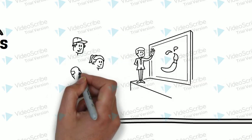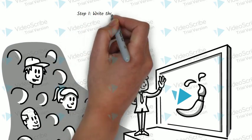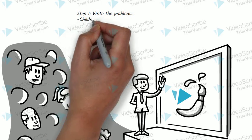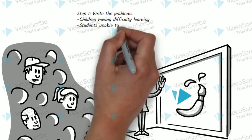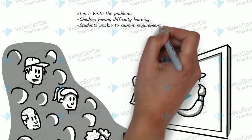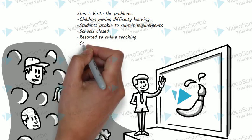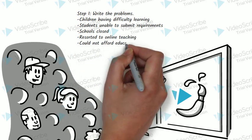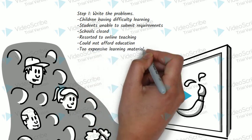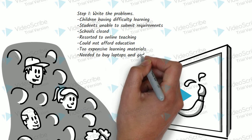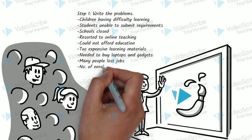From the example problem presented, we proceed to Step 1: Write down the problems. Children having difficulty learning. Students unable to submit requirements. Schools closed. Resorted to online teaching. Could not afford education. Too expensive learning materials. Needed to buy laptops and gadgets. Many people lost jobs. A number of enrollees dropped.